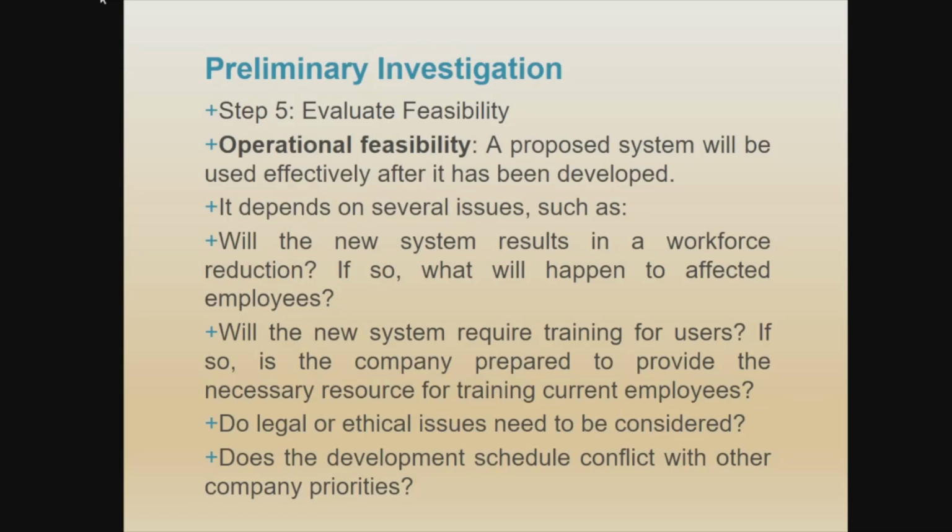Next, step number 5, you need to evaluate the feasibility or conduct the feasibility studies. The first is operational feasibility: whether a proposed system will be used effectively after it has been developed. It depends on several issues. Will the system result in a workforce reduction? If so, what will happen to the affected employees? Will the new system require training for the users?